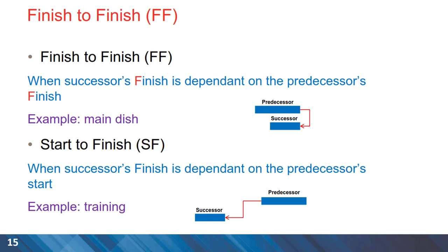Next activity relationship is finish to finish, and that's where the ending of two activities are directly connected. We can have a start to finish relationships in some instances as well.